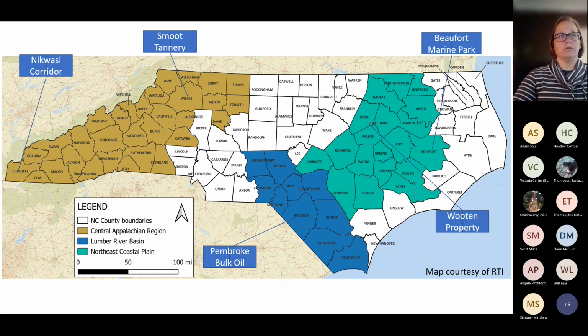One of the other primary documents that we have to submit for EPA is called the generic QAP. It's a quality assurance project plan, and that summarizes the overview of the quality components of the site work that we will be doing. With that, each consultant will work on a site-specific quality assurance project plan, which is essentially the site-specific work plan for what we're actually going to do, what samples we're going to collect, where, how deep. And that generic QAP was submitted to EPA and approved, which we were very excited about. So that means that we are on the path to submitting all of the next level of the site-specific work plans.